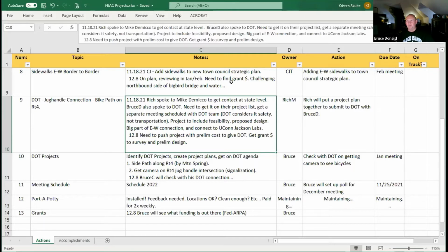There's a lump sum from a couple of these programs that's apparently going to become available. It de facto comes primarily through DOT because they're essentially the federal conduit. So ultimately, the discussion revolves around when DOT decides to advertise that there is money available, for what and to whom, and that's when the town perks up their ears and says, okay, there's X amount of money out there. One of the things we've been parsing internally with many of the groups I work with is how to get projects up to speed as soon as possible, because there is going to be money, and the people that have projects ready to go are likely going to get money, and then it's going to get harder again. This is a cycle.